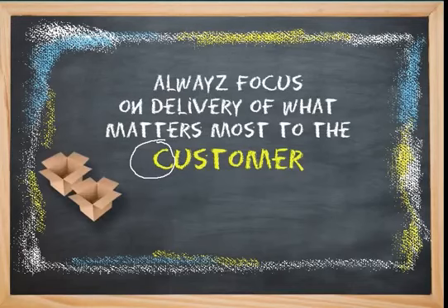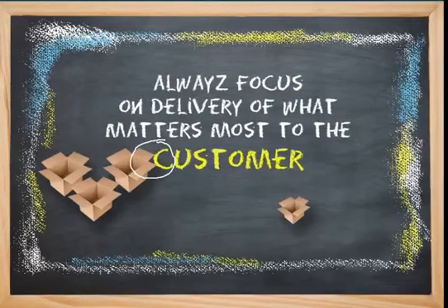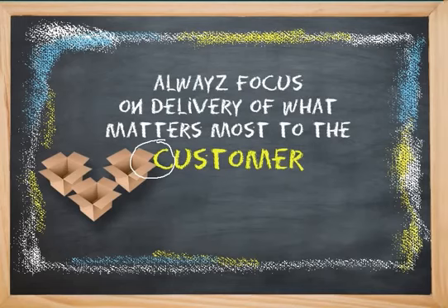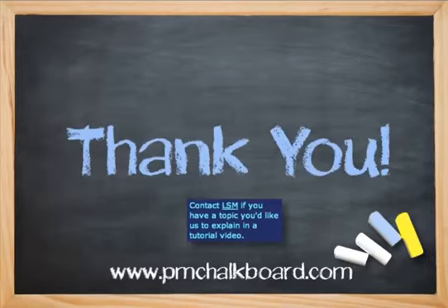This represents the major features that the customer really wants, and this is an example of a feature that is less important. What do you think happens? I'll tell you what. The least important feature at the bottom doesn't get implemented. It's a great technique to control cost as well as satisfying the customer with where cost can impact, focusing on the most important features. So now you know.